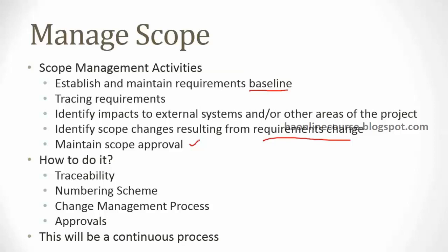You have taken that approval by formally signing off the BRD or approving the change request which is coming later as part of the change management process, right? So you're getting a firm commitment from the customer. So you can be rest assured that he will not go back on his word. He will not say, no, I didn't approve it, because you have a written proof, right? Now some organizations enforce taking a printout and then formally signing it off. Some organizations accept an email approval, right? So you need to figure out what is the process which is followed in the organization and stick to that.